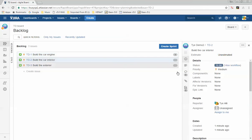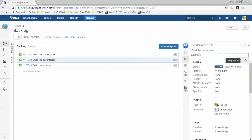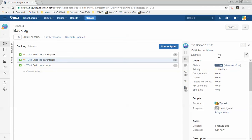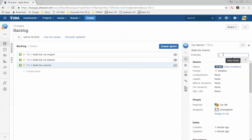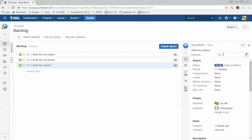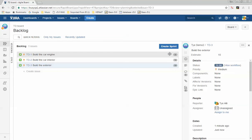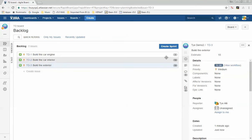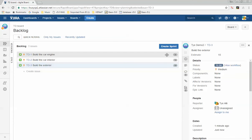My first story gets a 5 story point, my second story a 10, and my third story a 15. This means my second story will take twice the time of the first story, and my third story will take three times the effort of the first one.